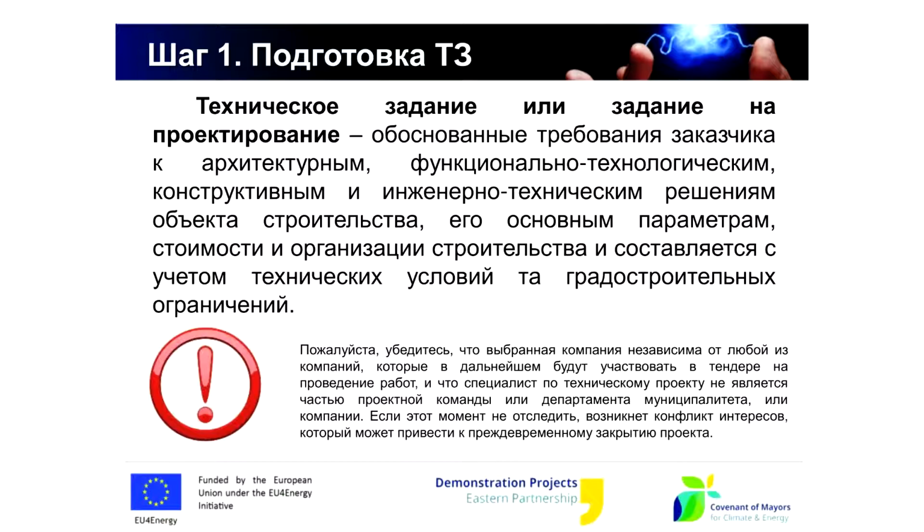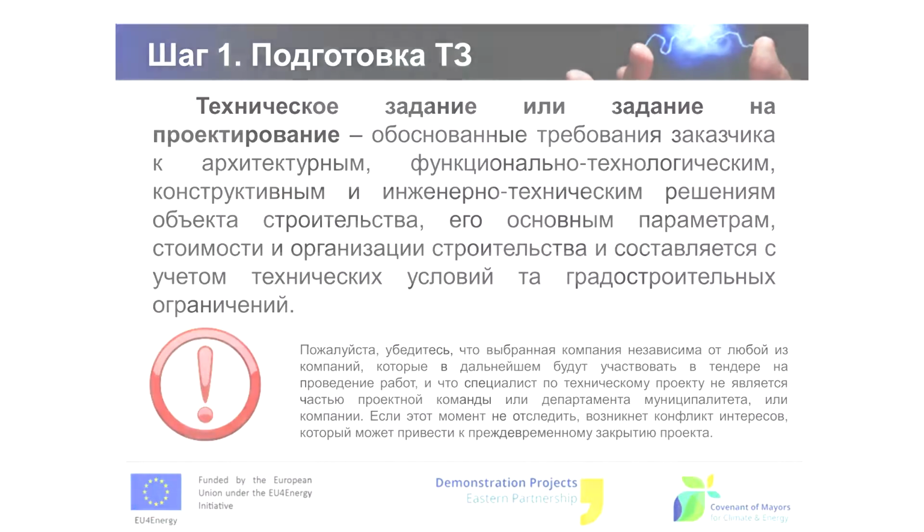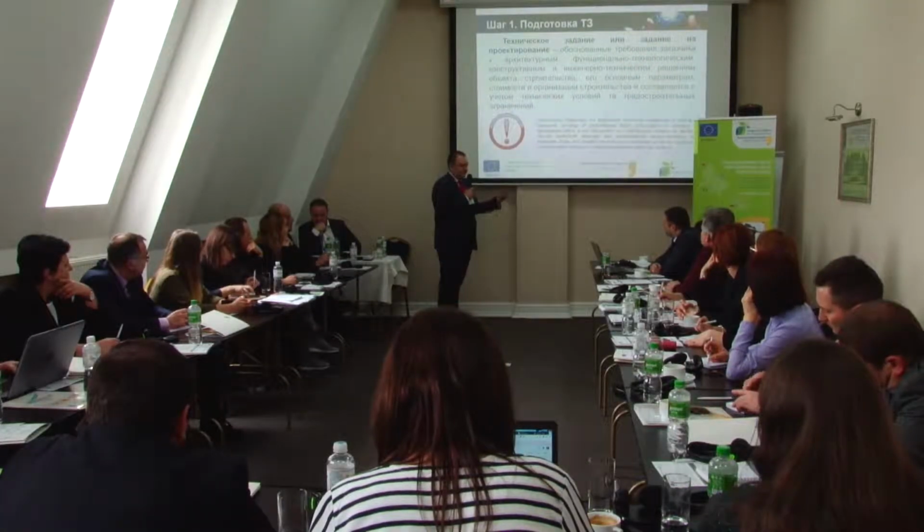And it is important that the designer responsible for the development of technical design be independent both of the team of the project and of the authorities, and of any would-be company that would perform works in the future and would be involved in construction.